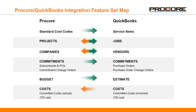The next piece is really the workhorse of the integration. With the integration, you are able to create your commitments, which include both purchase orders and subcontracts for each of your projects in Procore, and then sync them over to QuickBooks where they are used to create purchase orders on that side. You can also create your commitment change orders in Procore and sync those to QuickBooks. When commitment change orders are synced, they create new additional line items on the purchase order in QuickBooks that they are associated with.